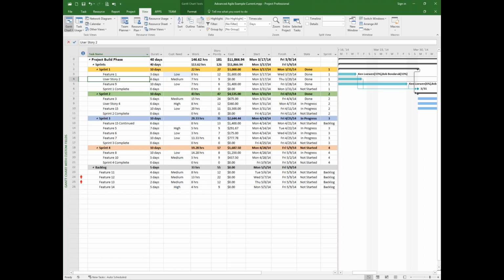There is no limitation with respect to how many you can connect, as long as the work item IDs do not overlap between the team projects, you are fine with that type of mapping. If you noticed my screen when I was doing the mapping and publish and refresh, we got a unique ID from the VSO, which is unique across the board, which connects the two items between two different systems, and that's pretty critical with respect to synchronization.